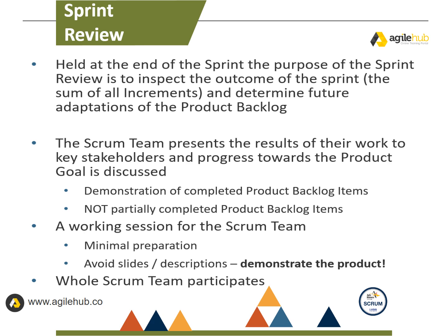Demonstration of completed product backlog items. Not partially completed product backlog items. It is a working session for the Scrum team. Minimal preparation is required. Avoid slides/descriptions, instead demonstrate the product. Whole Scrum team participates in the review.